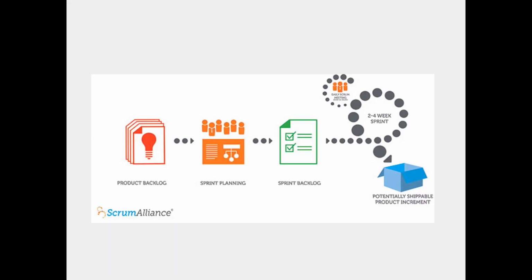And for this development, usually you have a fixed time. And this is called a sprint, right? And the meeting, usually the phase which decides which product backlog items you are going to use, we call sprint planning. So it could be like a 2 to 4 week sprint, which means the development takes 2 weeks to 4 weeks time. And within each of the 2 to 4 weeks, you have daily meetings just to see how you are progressing, right?